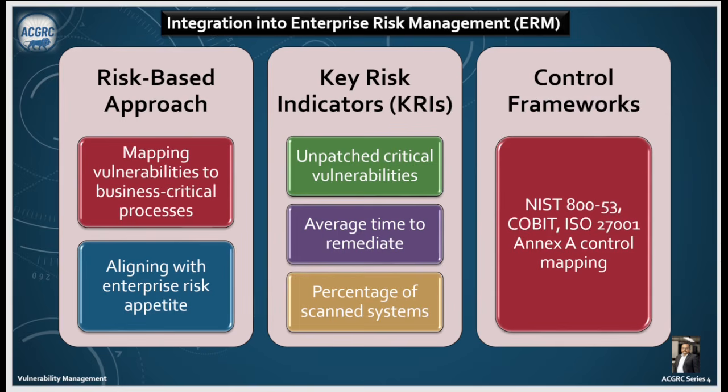The next is incorporating vulnerability data into the risk register. A risk register is a log for all major risks. Vulnerability management contributes entries like "high risk vulnerability in cloud storage may lead to data leak" and "delayed patching could lead to regulatory non-compliances." The benefit? Cyber risks are tracked alongside financial, legal and operational risks in a central place. That's the help which we get from a good risk register.